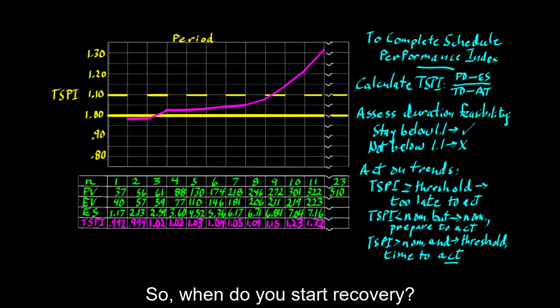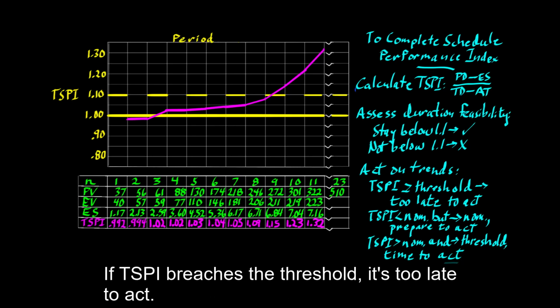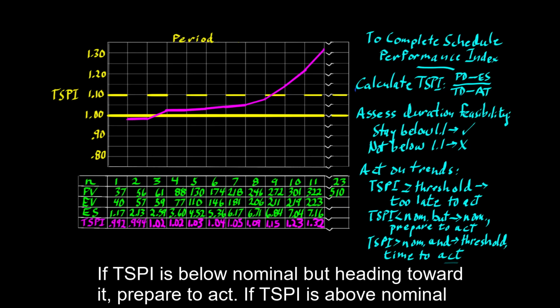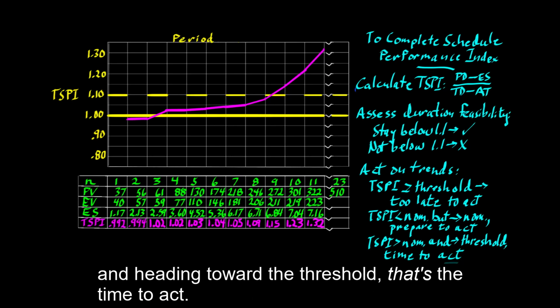So, when do you start recovery? When do you act? If TSPI breaches the threshold, it's too late to act. If TSPI is below nominal, but heading toward it, prepare to act. If TSPI is above nominal and heading toward the threshold, that's the time to act.